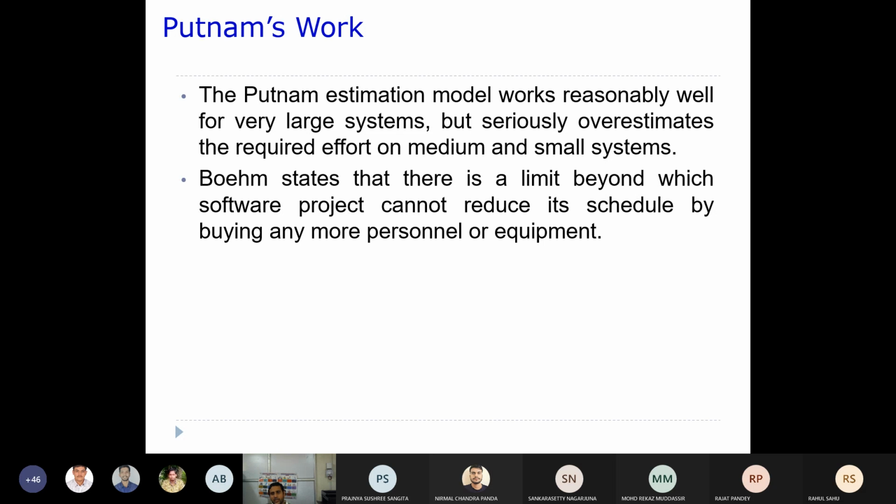There are certain things like, unless you finish requirement analysis, you cannot go into the design phase. Or unless the high level design is finished, you cannot go into the detailed design, right? So there is always a dependency.